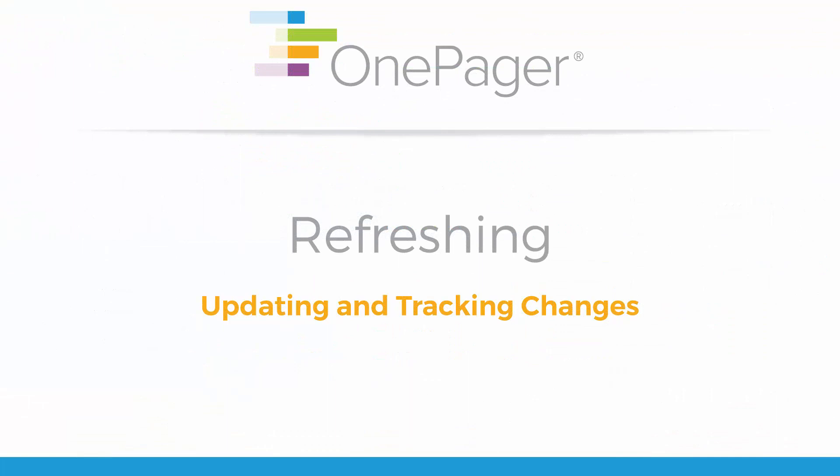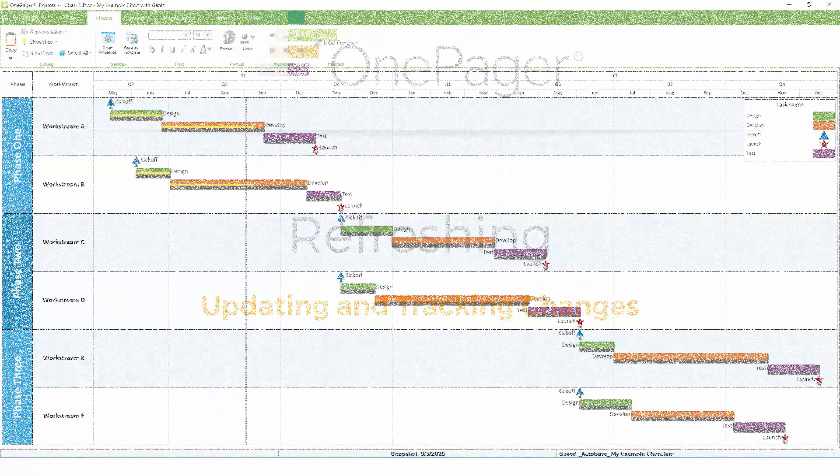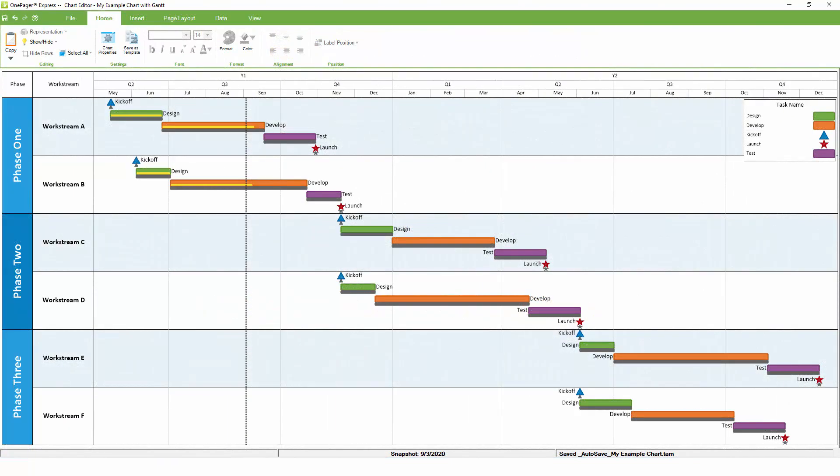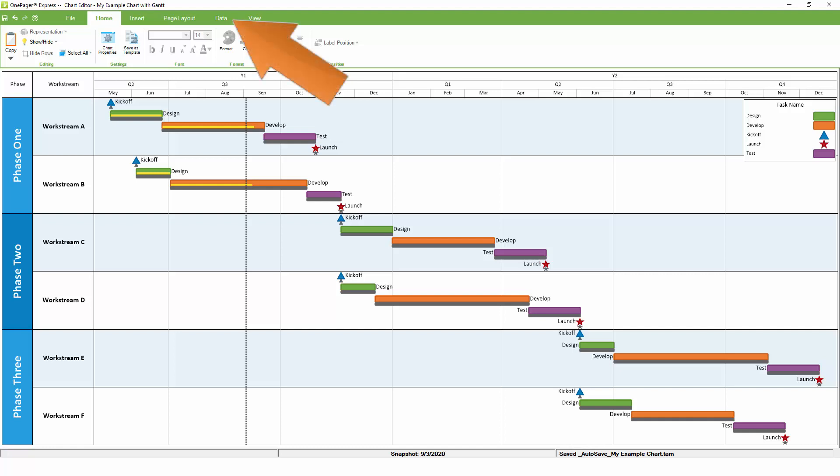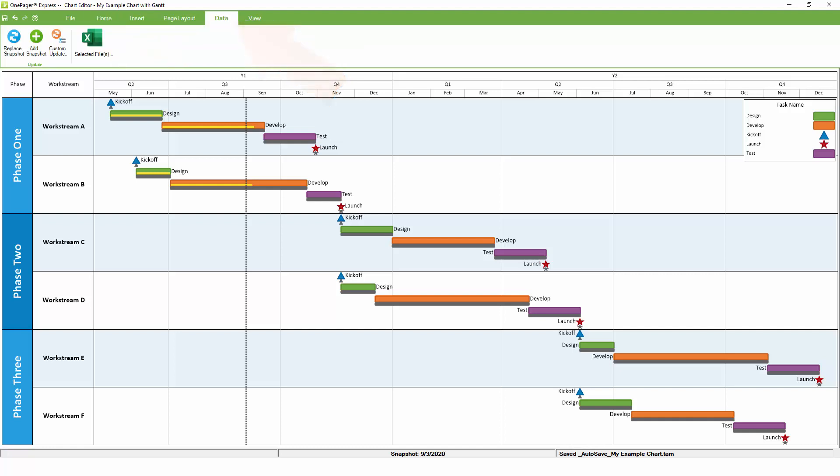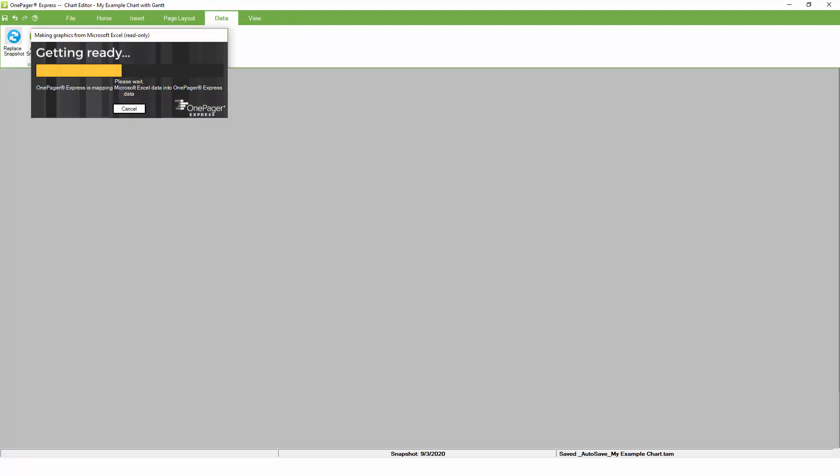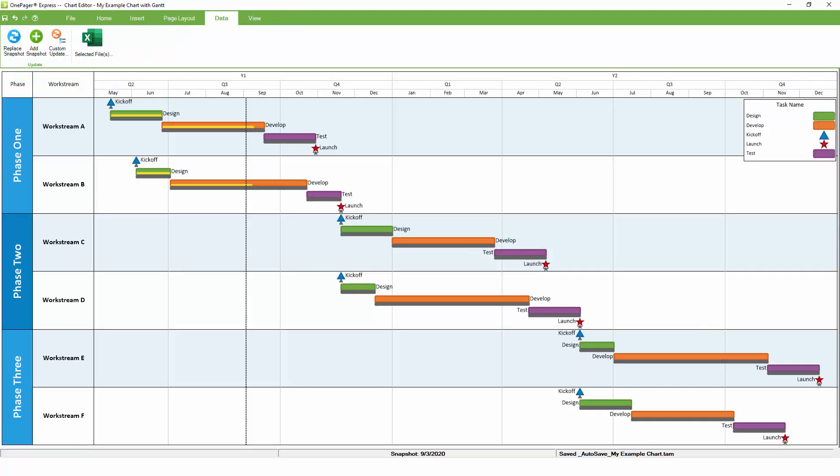Your OnePager chart is a living document. As you make changes to your project plan, you can refresh your chart to get a real-time update and even track changes over time. If you've just built your OnePager chart and you've made some adjustments to your project plan, you can pull these updates into OnePager by going to the data tab and clicking the replace snapshot button.